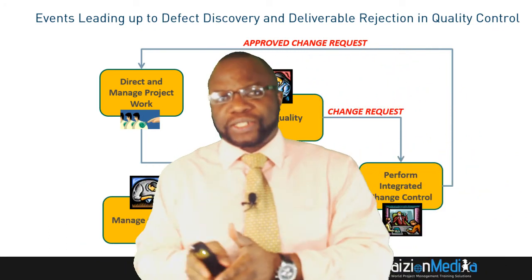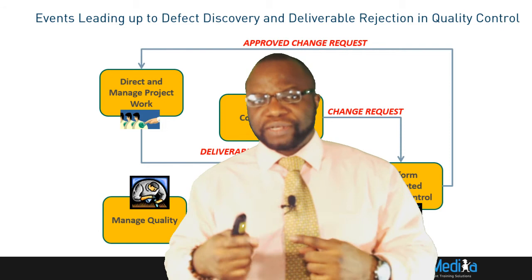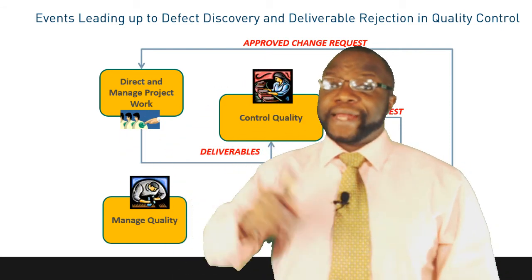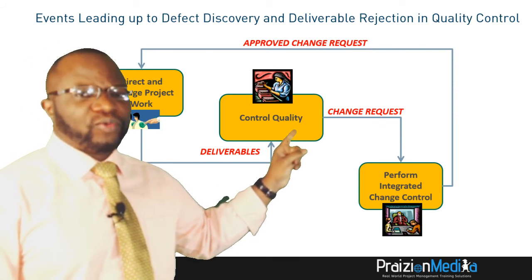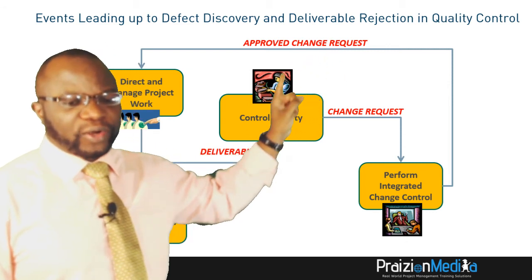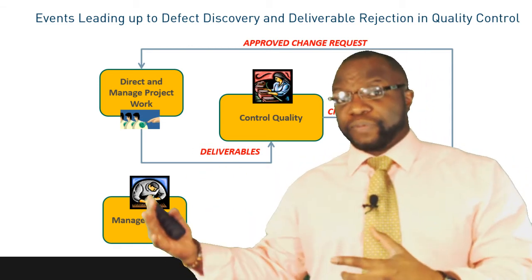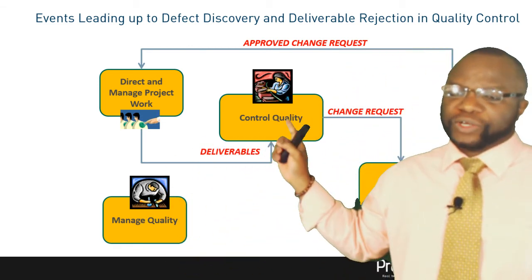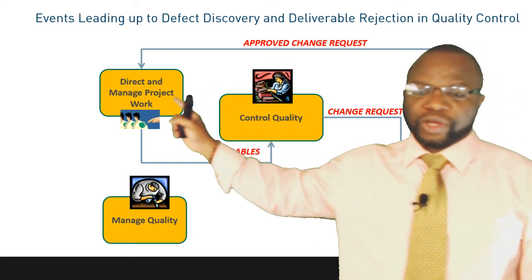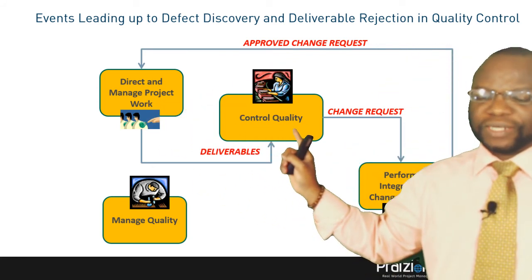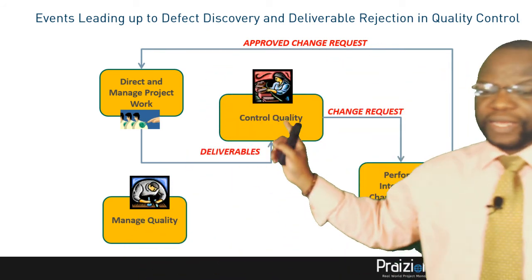You cannot just look at Plan Quality Management, Manage Quality, and Control Quality in isolation — that's not how it happens. There's a lot of interconnectivity between these processes. Don't forget that this approved change request is also going to be an input to Control Quality. We see this approved change request going into Control Quality because on the second go-round, we are going to inspect the approved change request — making sure that what was approved is not only done but is also checked — and hopefully we will not get another change request from the lady on the conveyor belt.